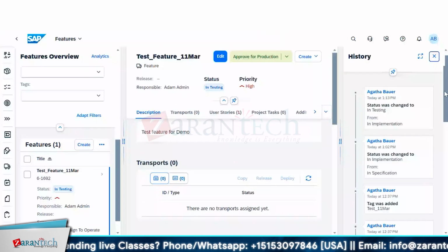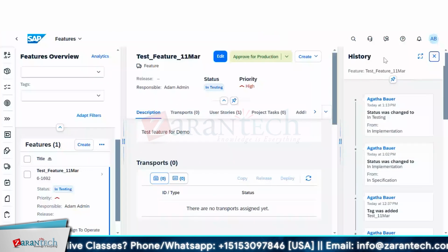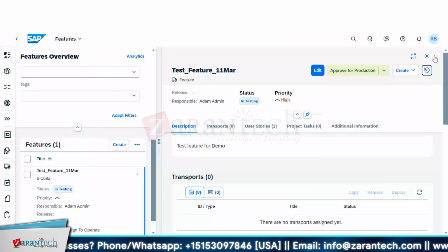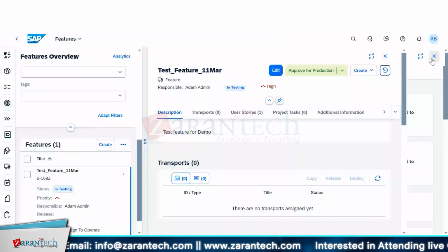This is fine because ideally not just anyone who has requirements can approve it. Only the business process owners for that particular stream should approve it. It's not like the SI partner, or whoever is using the development, comes and approves it. That would show up in the audit trail. To avoid that, you just request, send it for approval, and then they approve it. Once they approve it, it will automatically move.